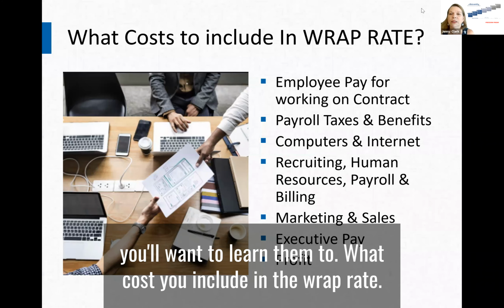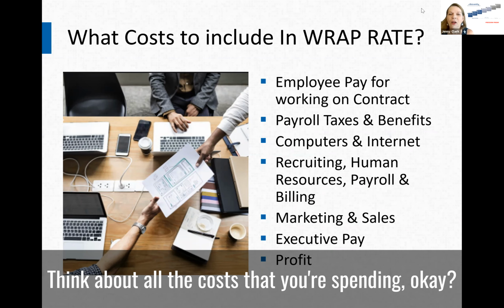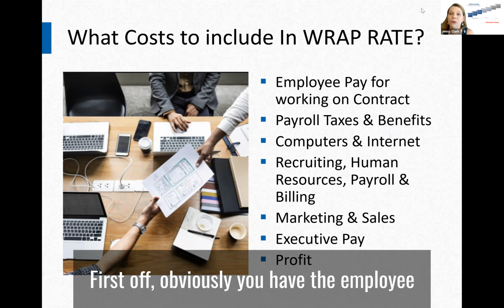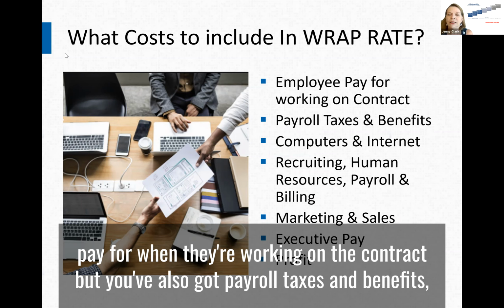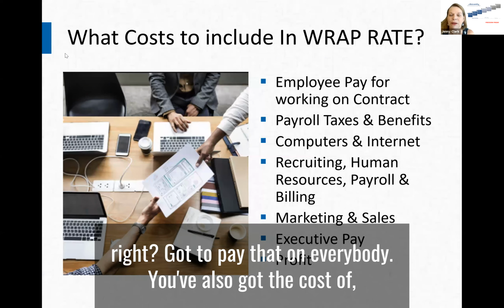What cost do you include in the wrap rate? Think about all the costs that you're spending. Okay, first off, obviously, you have the employee pay for when they're working on the contract, but you've also got payroll taxes and benefits, right? Got to pay that on everybody.